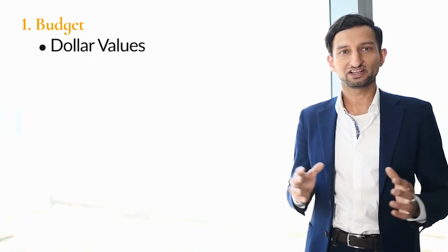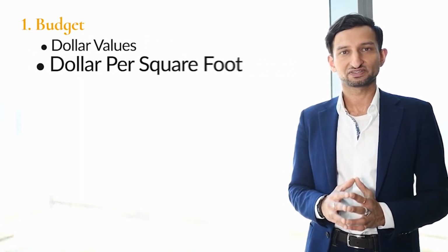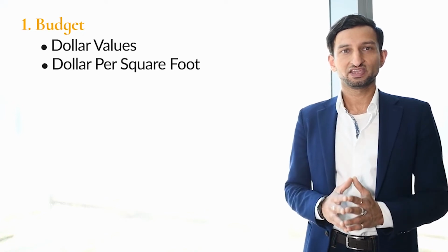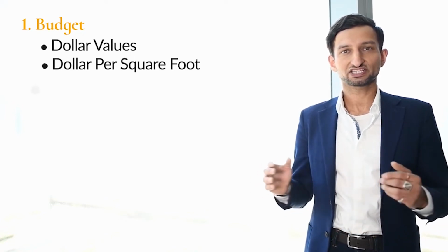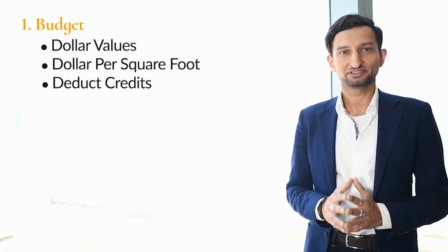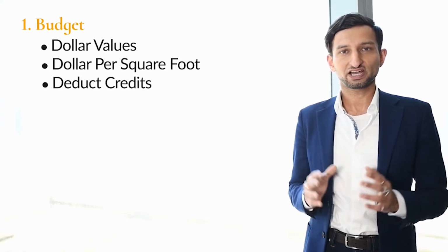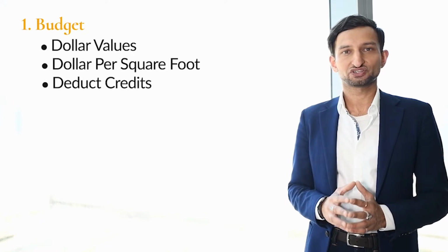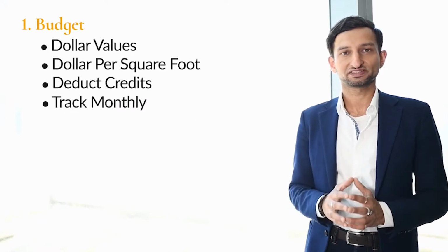Budgets should be all-inclusive of all vendors and core parts of your projects and be priced in dollar values as well as dollar per square foot values, cost per unit of area. You should also be sure to deduct any tax credits or any landlord credits that may be provided with your lease or property deal. Budgets evolve with the time and development of a project and thus should be tracked on at least an every other month basis.